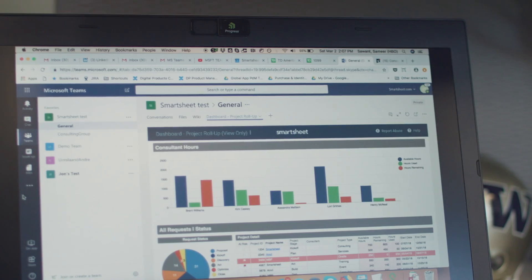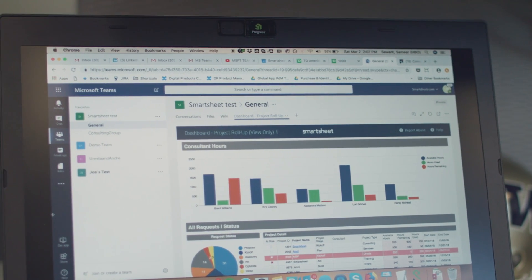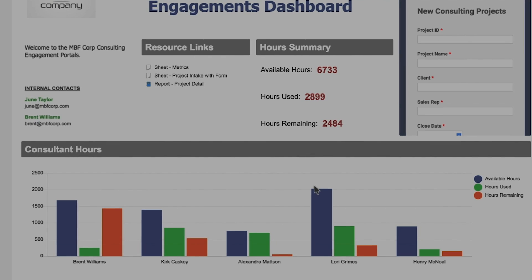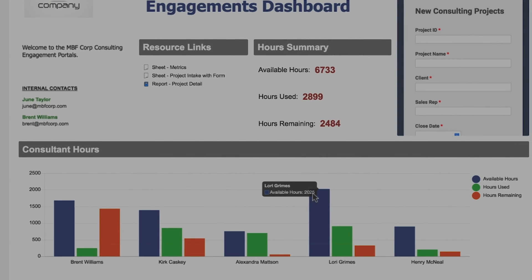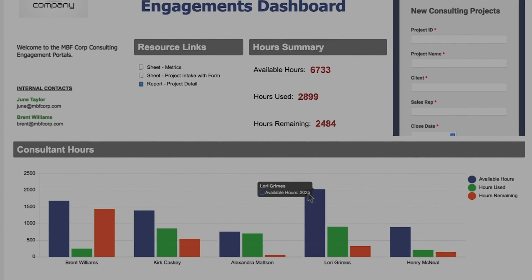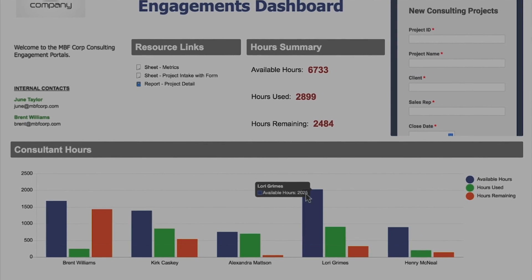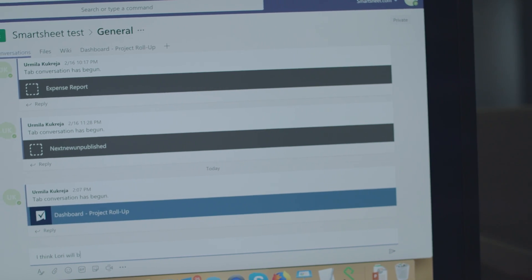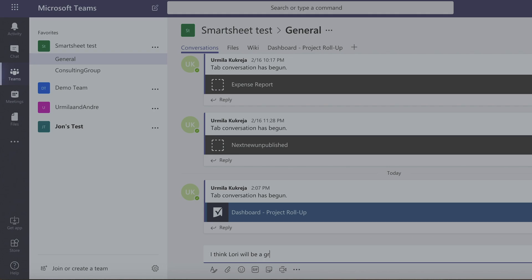Since the project was approved, we now need to staff it. Here we can see that Lori Grimes has available hours, so we'll assign her as the lead. Now the whole team can see who's responsible and chat in this channel to ensure upcoming deadlines and deliverables are met.